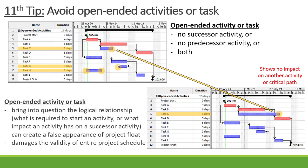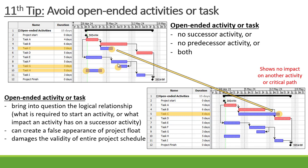So why should we avoid open-ended activities? First of all, it brings into question the logic relationship within a project schedule. We don't know what is required to start an activity if there's no predecessor activity, or what impact an activity has on a successor activity if it's not linked to a successor. It can also create a false appearance of project float, as you might not know the correct float of an activity if it's not linked to a predecessor or successor. And lastly, it can also damage the validity of your entire project schedule.